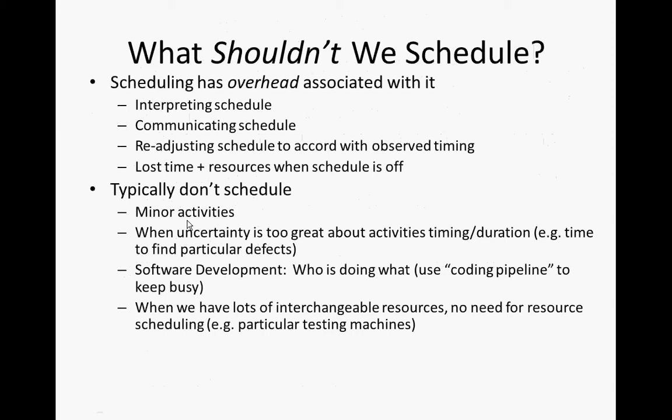In most situations, for example, when we have a resource, such as an elevator in a building, we don't schedule at what time the elevator will be on a certain floor. That's dynamic. Depends on the vagaries of who requests it, etc. Now, if we have a construction project going on in a building which requires very intricate movement of materials up and down throughout various floors, and there's very well understood staging about when things have to be available, we might actually schedule an elevator.